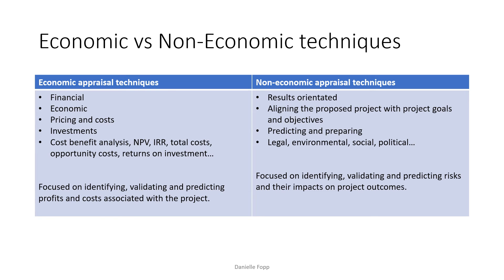For example, from an environmental perspective, the client might want to know: are there any environmental approvals which may impact the project's ability to proceed? Are there any projected detrimental environmental impacts? They might look at water, air, land, sound, and geography. For legal, we touched on this previously — are there any legal issues regarding land acquisition? Then they might look at staffing, management, and social benefits. Ultimately we are asking: does the proposed project align with the project goals and objectives?